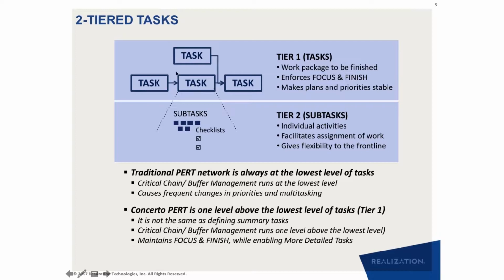Defining what is a task is what we have found is the most important thing in planning. It is not what the size of the buffer should be. It is not when a buffer should turn red, yellow, or green. Those are minor things. Those are almost chup checks, if I were to use Eli Goldratt's words. So how much the buffer should be, and when it should turn red, yellow, green, is a chup check. What is the most important thing in project planning is defining the task at the right level.